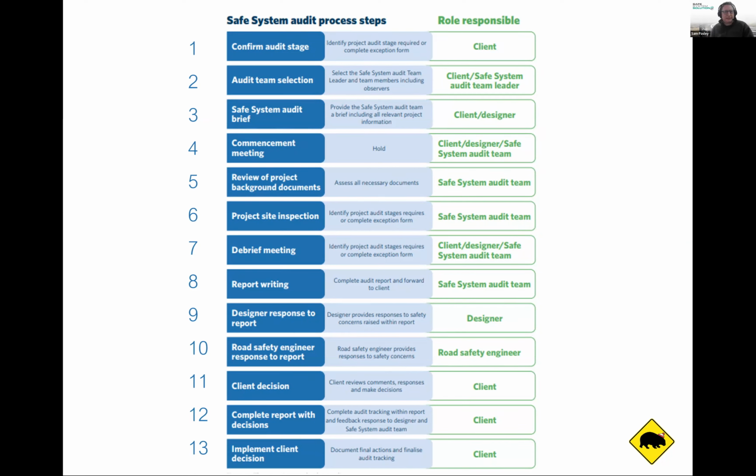Client decision. So the client decision is, I think, Matt, you wrote about the action taken. So yeah, the client makes the decision on what it should be. It might be the project manager from the project, which is the usual case in New Zealand, or it could be whoever has that delegation within the client organization.